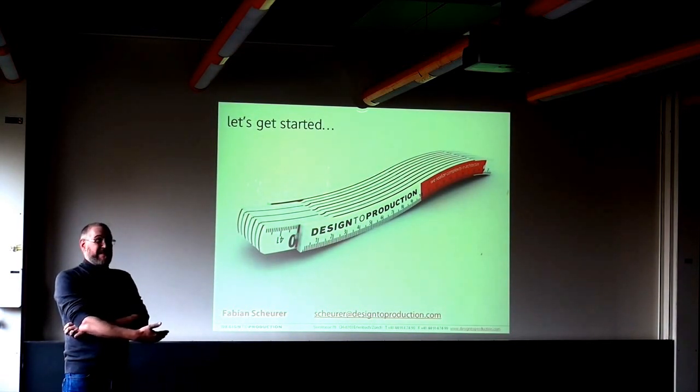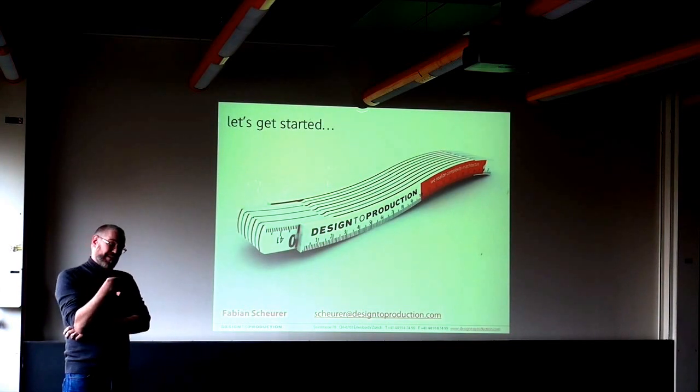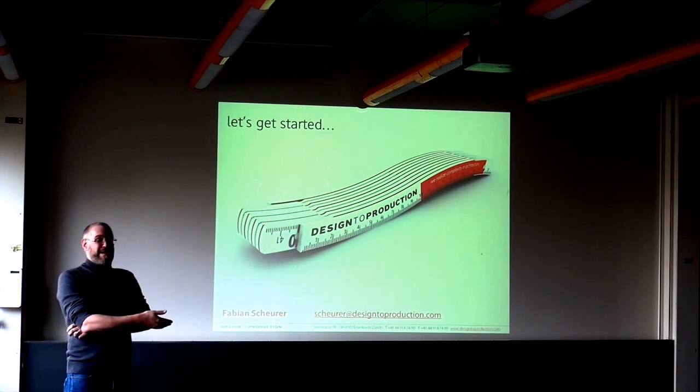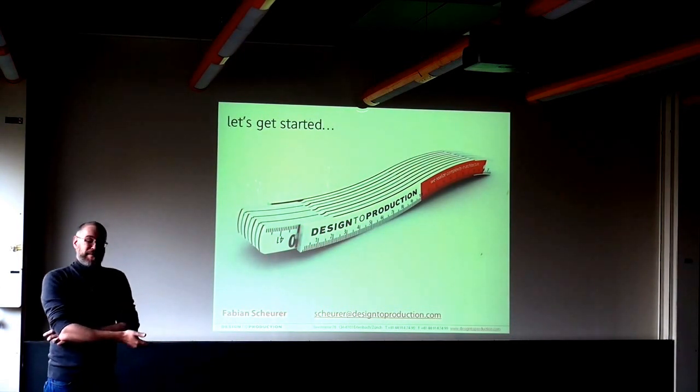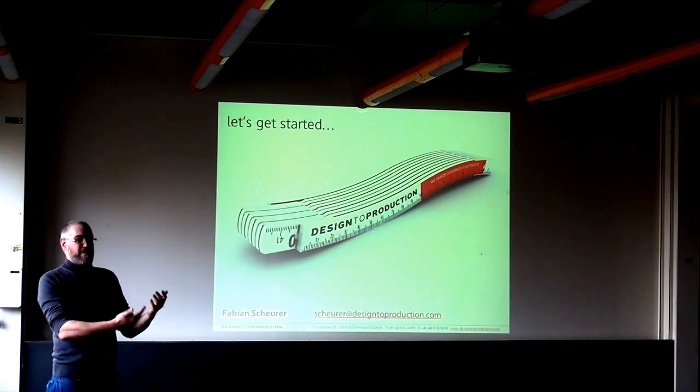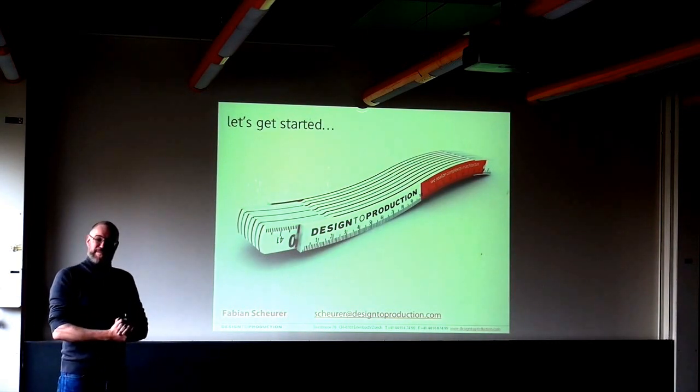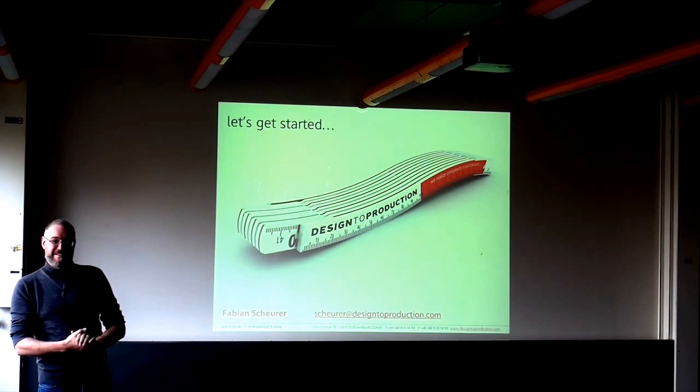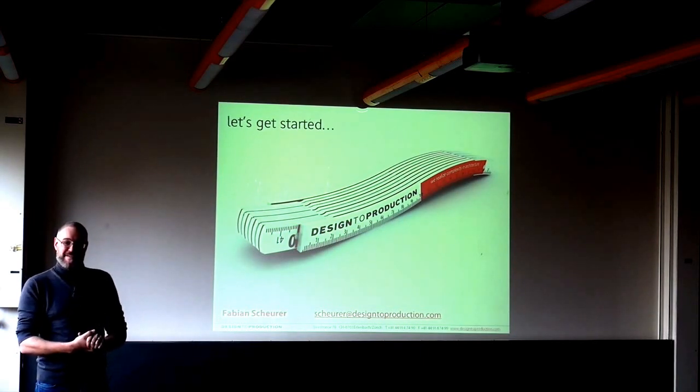I'll do it by hand now. And then tomorrow somebody comes and says, oh, we just changed this. And you say, okay, throw it away, do it again. If this only happens once, then it's okay. If more changes are coming, you have made a wrong decision somewhere. To somehow feel where this is going is a thing that comes with experience and only experience, and still I'm wrong too often.